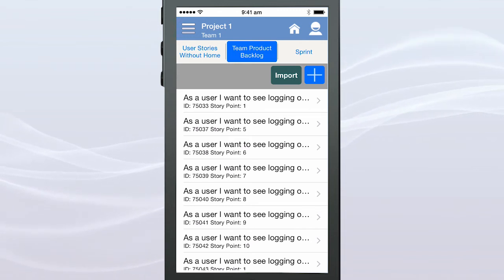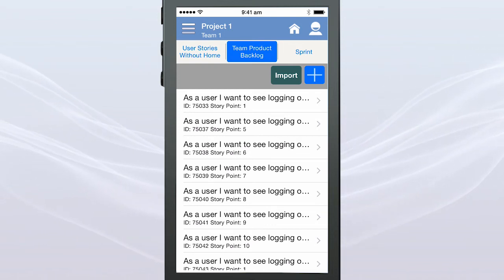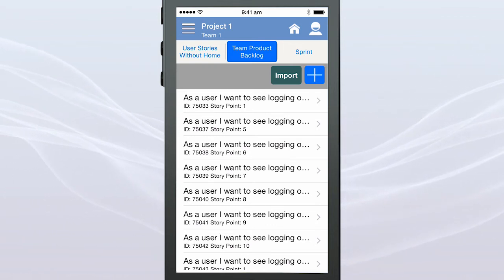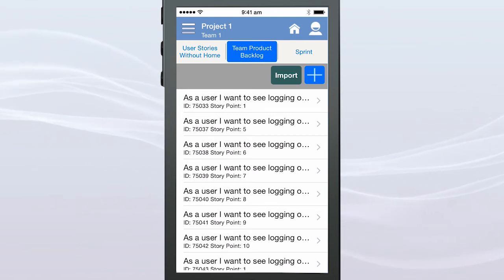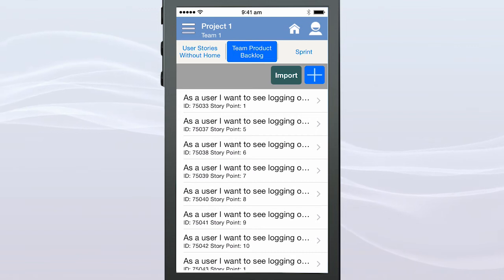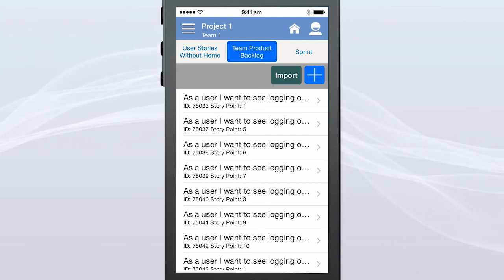Sprint is a term used in the Scrum framework to describe the basic unit of development time. In most cases, it will be from 1 week to 1 month in length. A project release is usually made up of many sprints. Note: a sprint can only be started by a Scrum Master, product owner, or one who has the admin rights. A developer does not have the right to start a sprint.